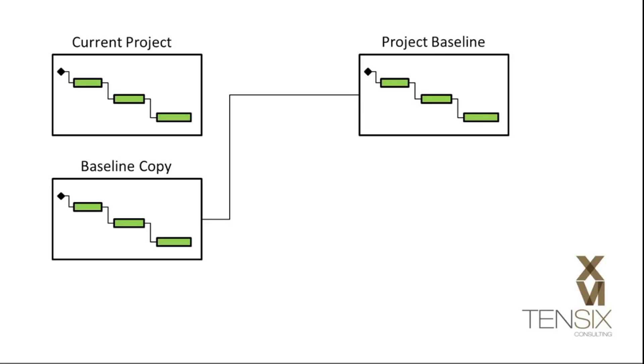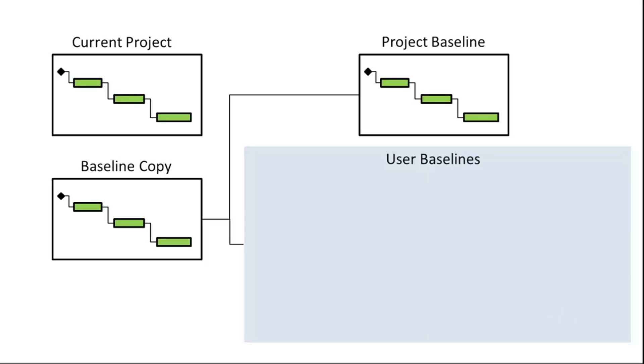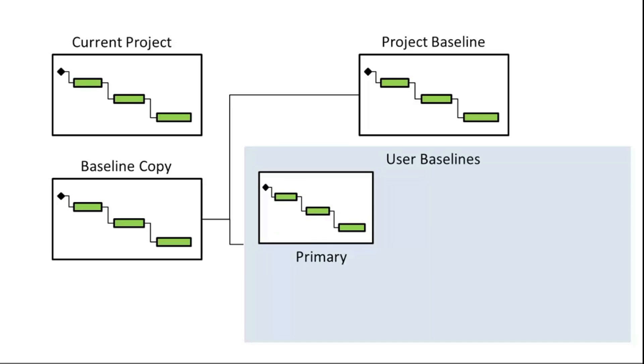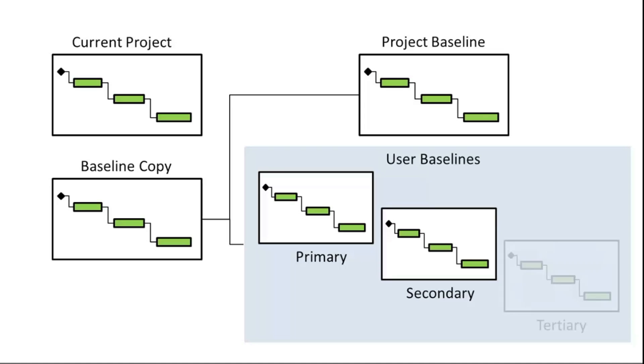P6 has the concept of a project baseline, which can be thought of as a master baseline, and user baselines, which can be used for more ad hoc snapshots of the project at various stages of its execution. You can assign up to three user baselines: primary, secondary, and tertiary.